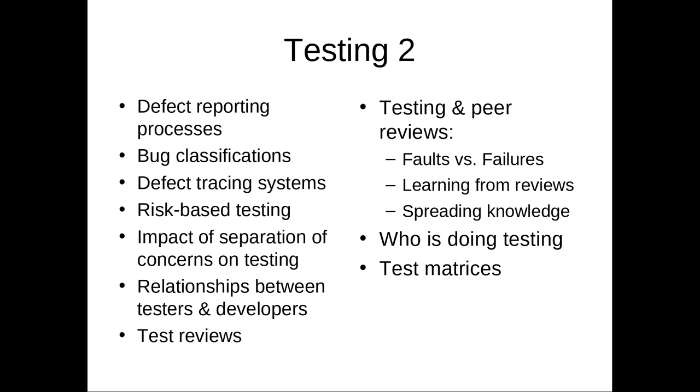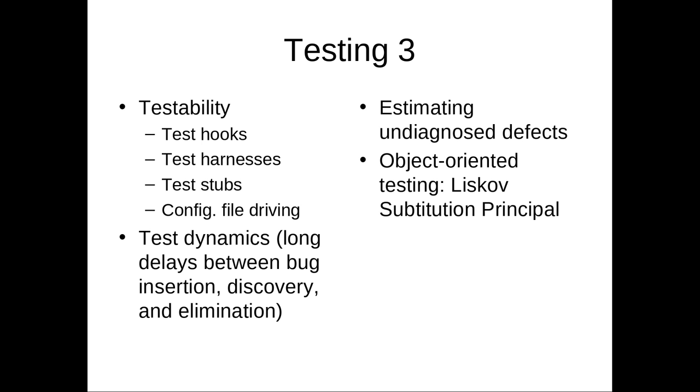The variable names they use, the commenting that they do, the clarity of how they express certain things. We kind of talked about this. There are often long times associated with testing, and this is one of the reasons why you need to be careful when deciding whether or not to fix a bug, because you might not have time for another round of thorough testing. You might not have time to run those regression tests, right? You might have impaired an earlier feature of great importance to the user by trying to fix this minor defect. And if you don't have time to know that, because you don't have time to run the regression test, it may be one bridge too far.